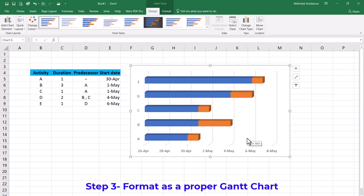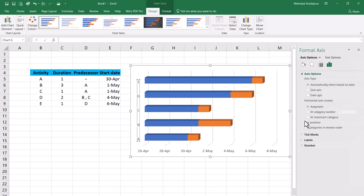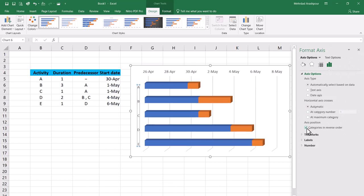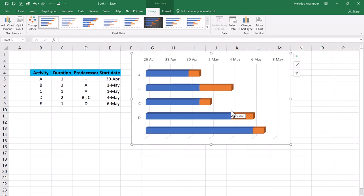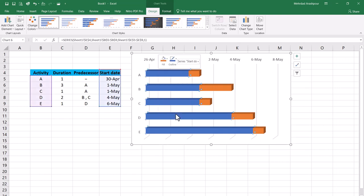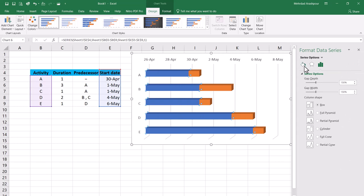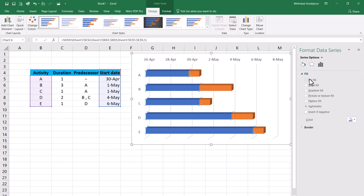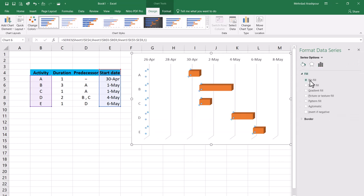Step three is to format the bar chart as a proper Gantt chart. First we can align our five activities with our tabular data. Double click on the activity labels and from the Format Axis menu choose categories in reverse order. Next we should get rid of the blue segments for each activity bar since only durations must be shown. For that right click on a blue bar and from the Format Data Series menu choose no fill to hide the information related to start dates.